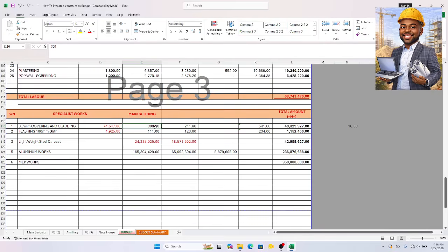I have a total area of 300 here. 300 divided by this is 2.77. If I add 10% for lapping and 5% waste, that is 1.15. This times 1.15, that's 15% for lapping and waste. I have 31 pieces.